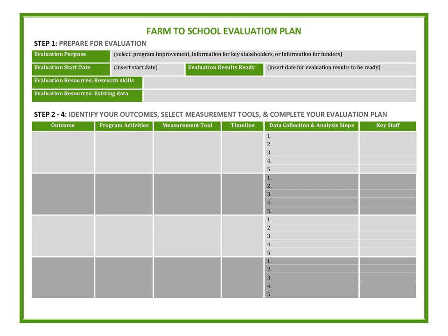You can also go step by step to see what measurement tool you're going to use or develop to measure whether or not you've actually increased those economic opportunities for farmers. You can map out the timeline by which the measurement will take place, different data collection and analysis steps, and then who, as part of your project staff or project coordinator staff, will actually complete that part of the evaluation plan. So it's a great evaluation program planning tool. And being in Word, you can fully customize it to your project needs.